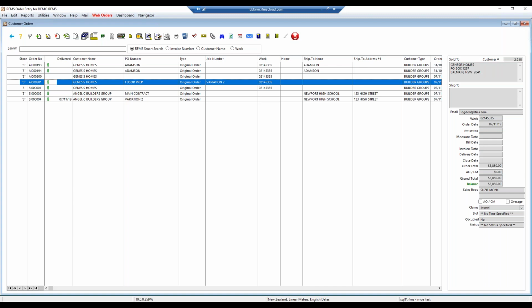There's several applications for billing groups in your business. The first is for commercial contracts. So that's where you've got your progress claims each month until the project is completed using percentage billing. The second example is insurance claims. So where another order might be added for the customer for, say, the excess, an upgrade, or some extra areas that they're choosing to do. Another application would be remedial work on a completed job.